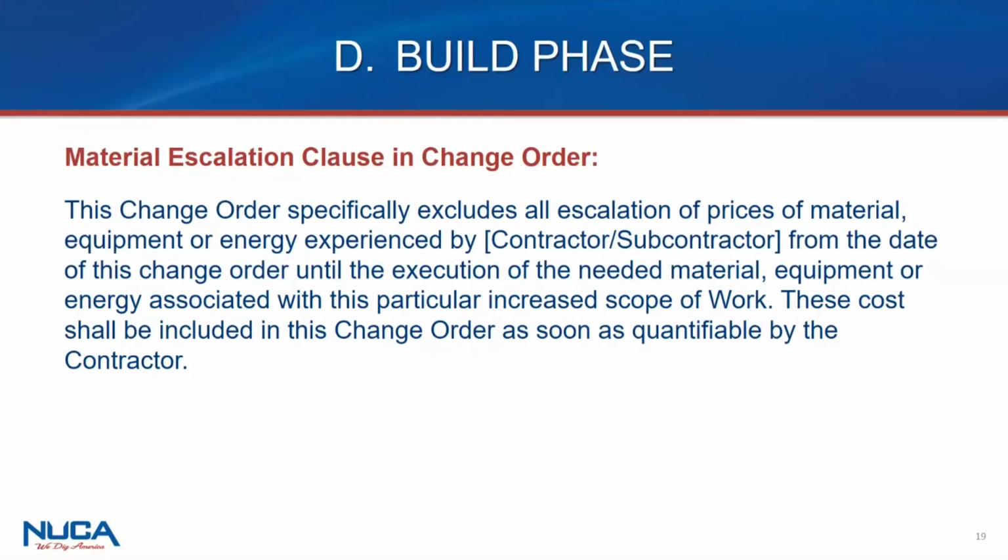So if you can't put in a fully loaded change order, think about putting in this language. And that is also a good recipe for the actions of people and acceptance of this. If you got acceptance of this on a few change orders, it did impact your contract and did open the door to a modification of that overall, where you might be able to come back in a more global sense and look for additional money. So I guess the sum and substance of my recommendation here is look for the opportunities.